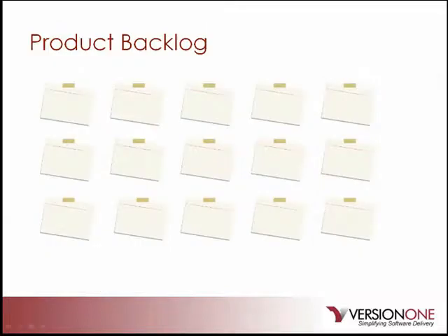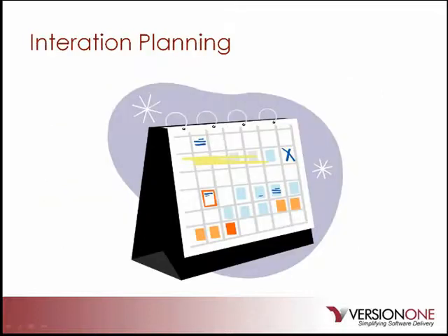So estimating stories is similar. Using story points instead of dog points, you assign a number to a story based on the size and effort to implement. We'll use the same pointing scheme we use for the dogs: 1, 2, and 4. This is valuable information that's going to help us down the road during planning. So now that we have our stories prioritized and estimated, let's look at how to use this information to plan an iteration.